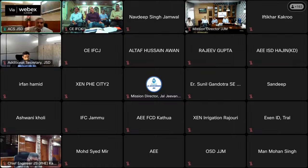Vivek first. Sir, as in the SBD, the 4,000 gallons is the minimum requirement. We take whatever safe discharge is available there. It may go beyond 4,000. We never deny it. We take. But then what is the incentive to that guy to go beyond 4,000? Nothing, sir, because that is not related to the depth of the drilling. The discharge available is not directly proportional to the depth of the drilling, because we pay him as per meter depth. And we take wells beyond 4,000. 4,000 is the minimum requirement which we have kept.